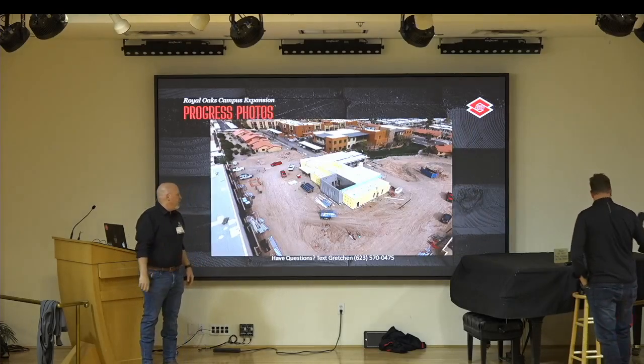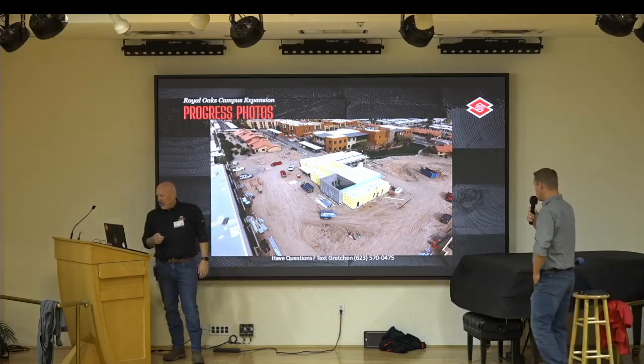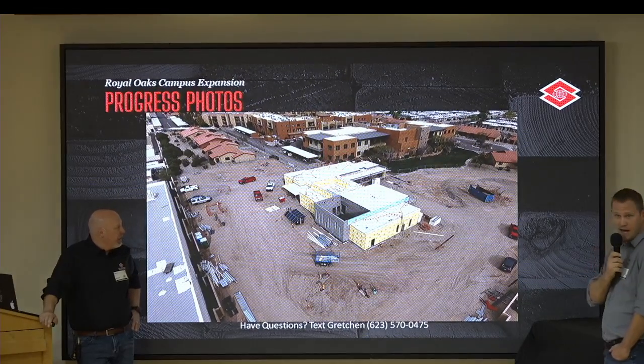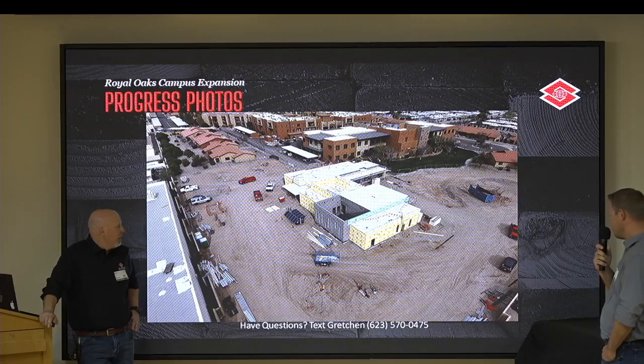All right, Kelly, you want to talk through some Vita pictures? All right, yeah, back to Vita. So again, from this perspective, you can see we're looking about northwest. Everything on site is going to change pretty dramatically between now and next month. Like I said, we're going to be going through grading the entire site, getting ready for curb and gutter. So by April 1st, we should see some concrete in place around the site.